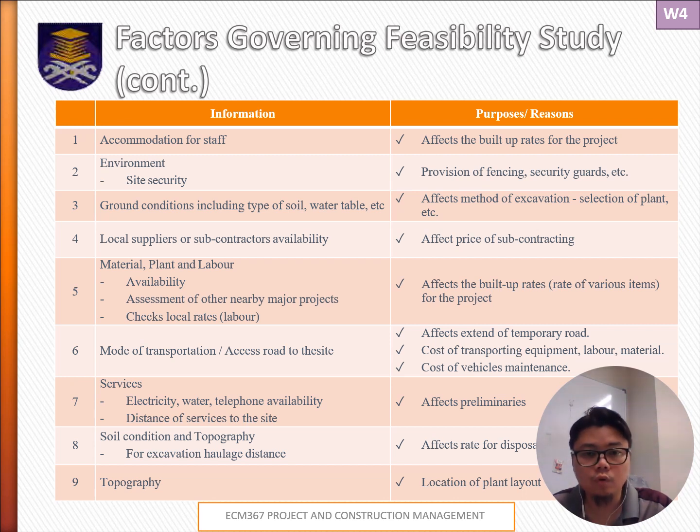And we also have to look out for the ground conditions, including flood risk. We can check records to see if the area has flooded before, and we need to ensure the drainage system can handle the rain. Well, basically you can spot a flood prone area by looking for signs like water loving plants, marks on trees or buildings that show water levels, or if locals have boats like sampans readying for floods and so on. And then having suppliers and subcontractors nearby can also save money.